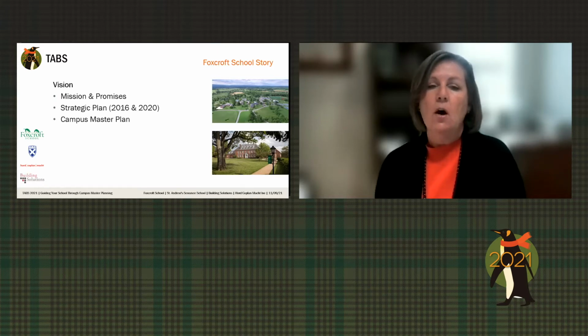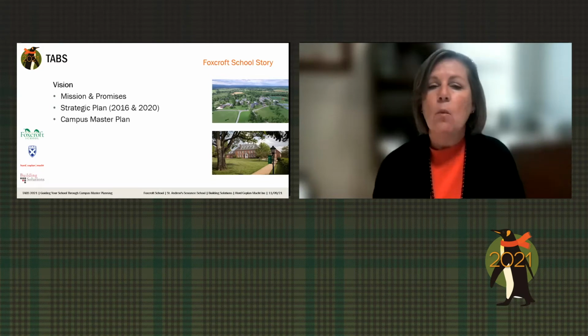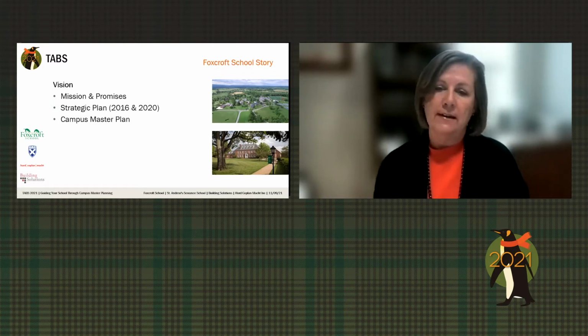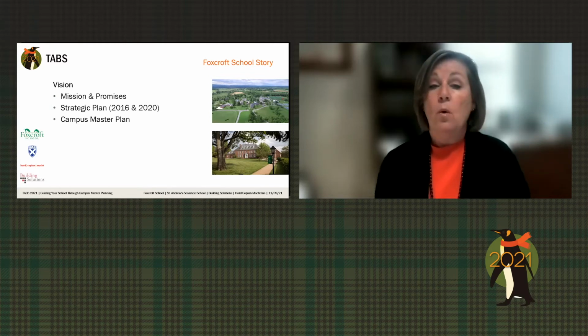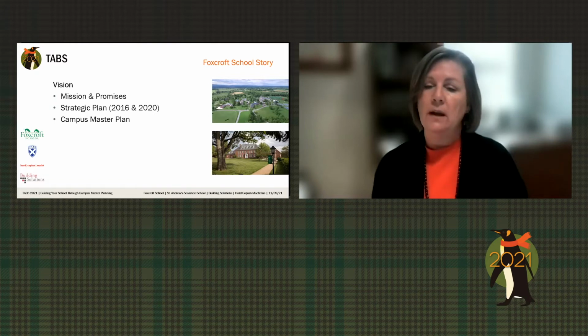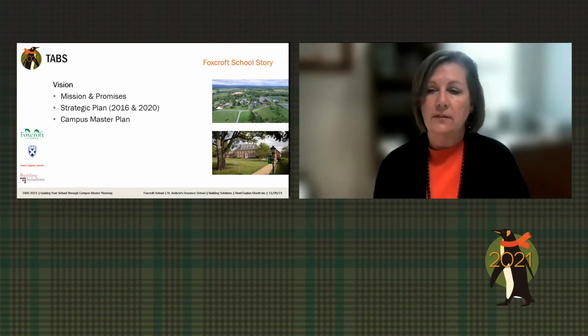I engaged all of our stakeholders with the aid of Peter at HCM to find out what was important to them as we went through this process of a campus master plan. While we were doing that, I was also using our facilities department to really assess what our buildings were about. What were the conditions? Where were the needs? How old were various mechanical systems? What was the priority from a physical plant standpoint, not a program standpoint, but a plant standpoint, prioritizing fire, life, and safety repairs. So we needed a jumping off point.